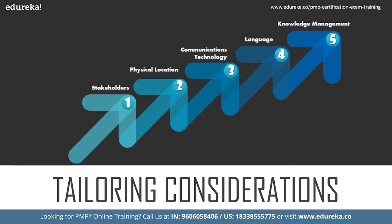While looking at those communication needs, one must ensure communication happens as needed by the stakeholders. Stakeholders need to be identified. Looking at the overall framework of 10 knowledge areas, 5 process groups, and 49 processes, in the initiating process group there are two processes: one in integration management and one in stakeholder management. Once the project manager is assigned, the first job is to identify stakeholders.